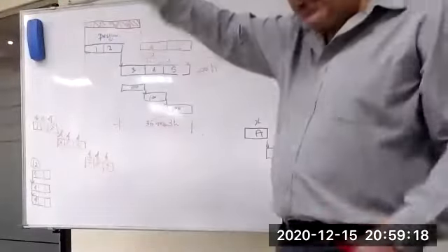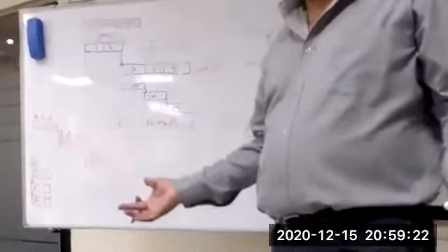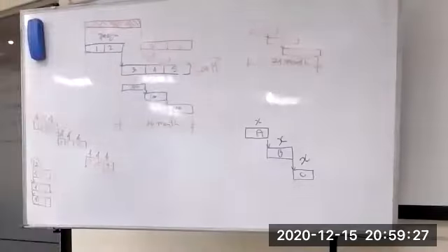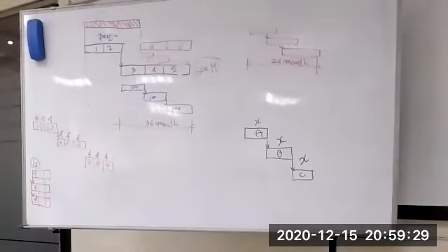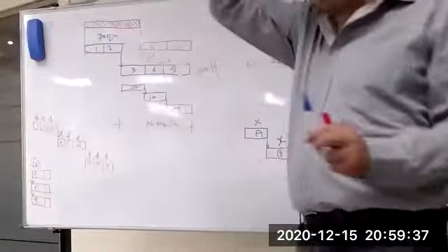Why not? I can do it in parallel. Why? If I have 3 X, I can do it. What's the problem? I can work in different areas. Maybe this is a room, and there's another room, and another room. In this case, what we call it is time constrained. Time is constrained to use the efficiency of your X, segregating your X at the same time.